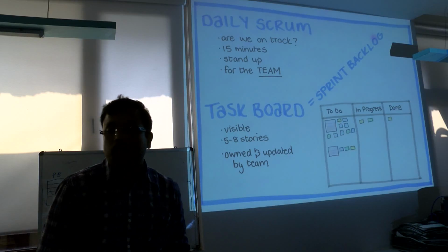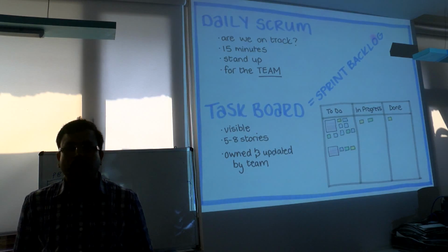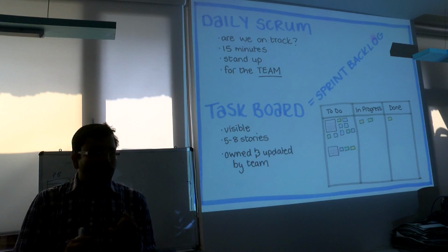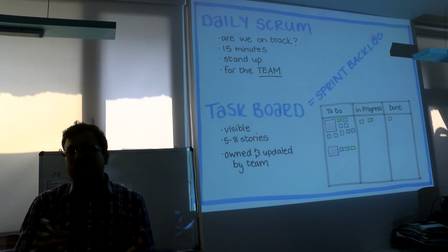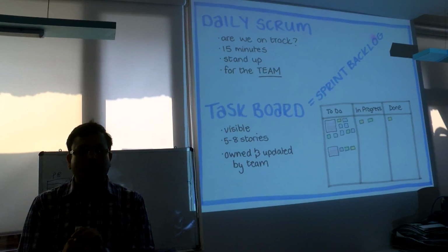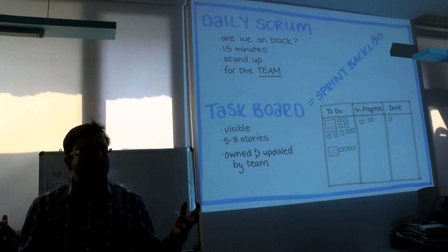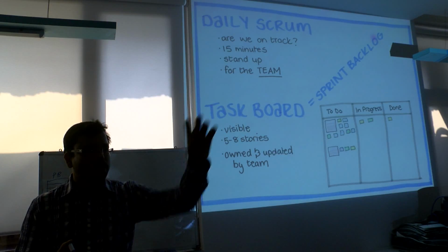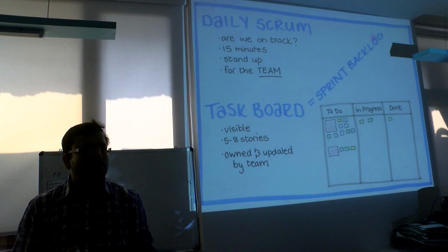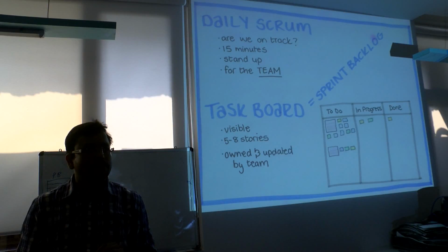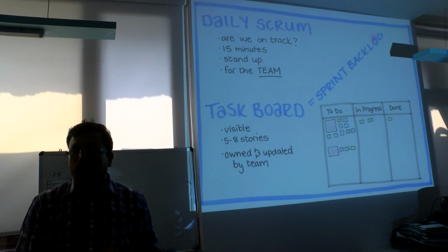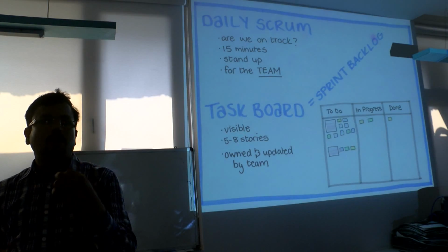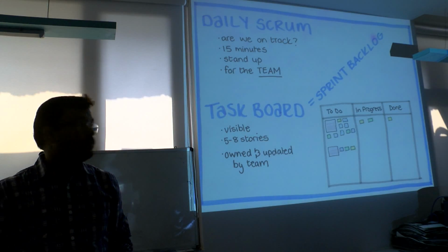Now, after sprint planning is done, think of a two-week sprint, which means 10 days. Just think like this, 10 days. One day goes to sprint planning, some 4 hours, where you sit with the team. So there is a story board, an epic board, always. A story is the minimum functionality task. After the 4 hours, of the 10 days almost 9.5 are remaining.